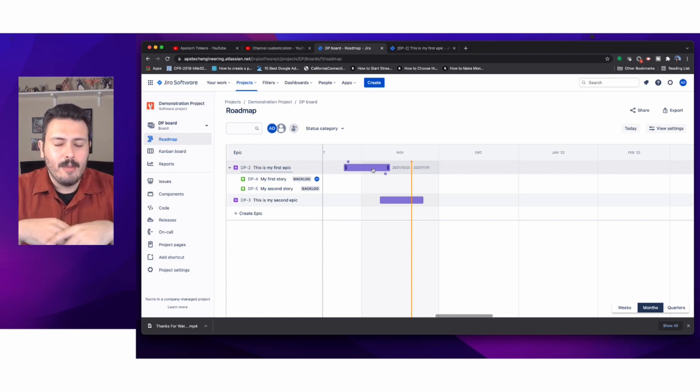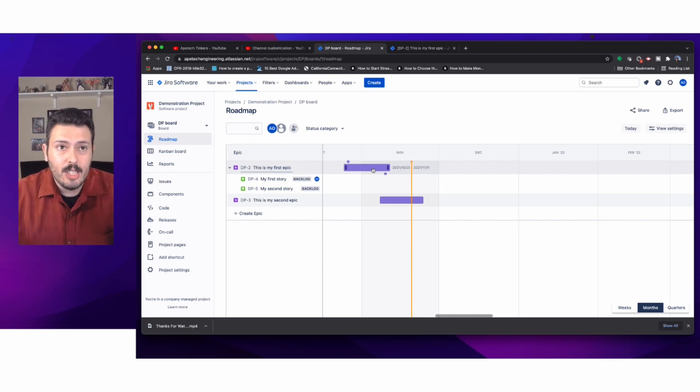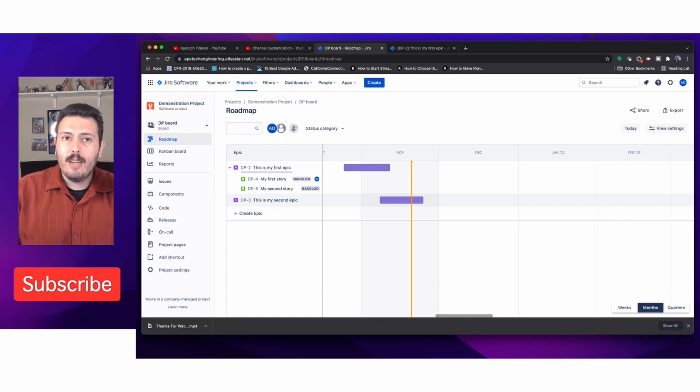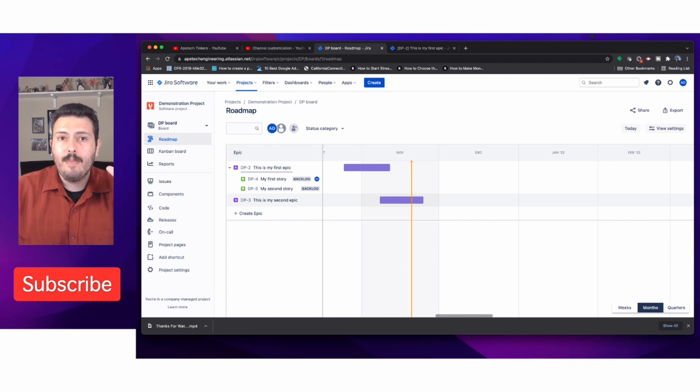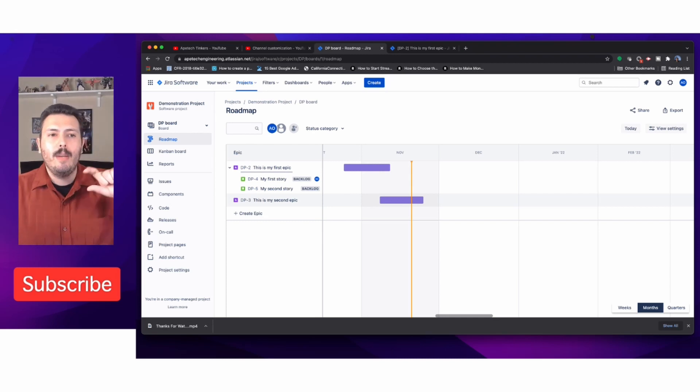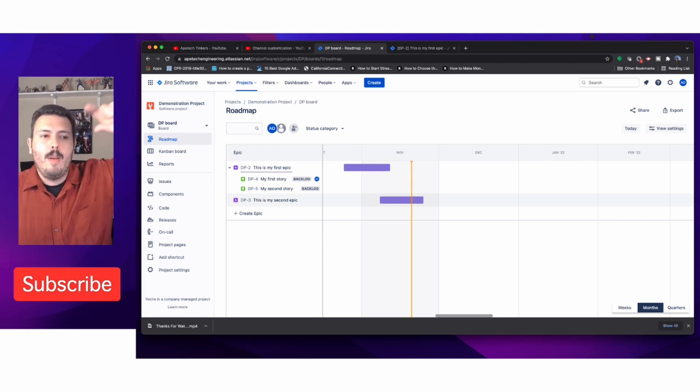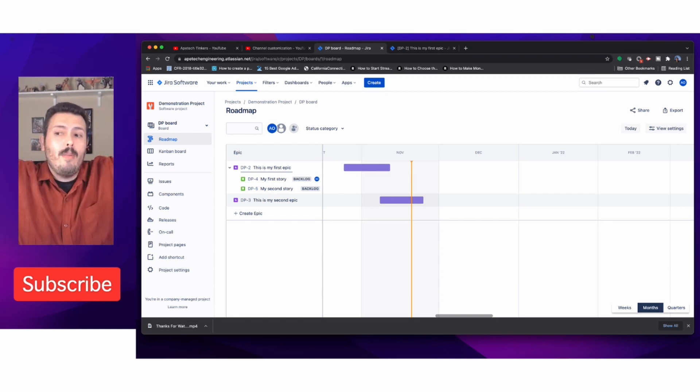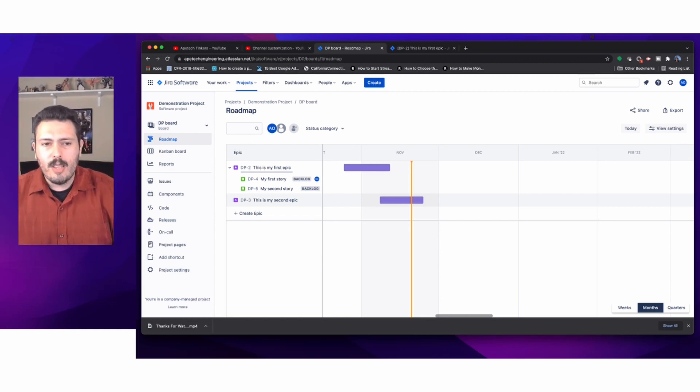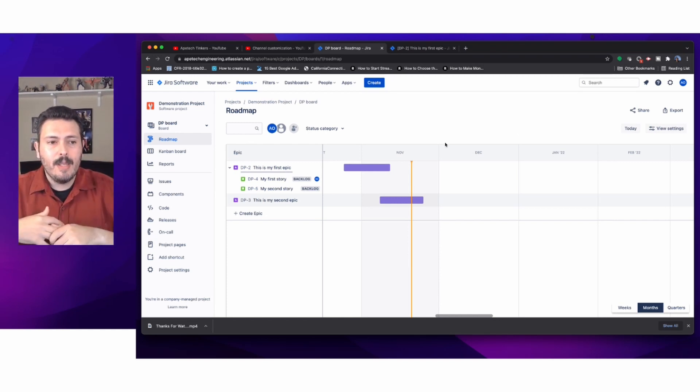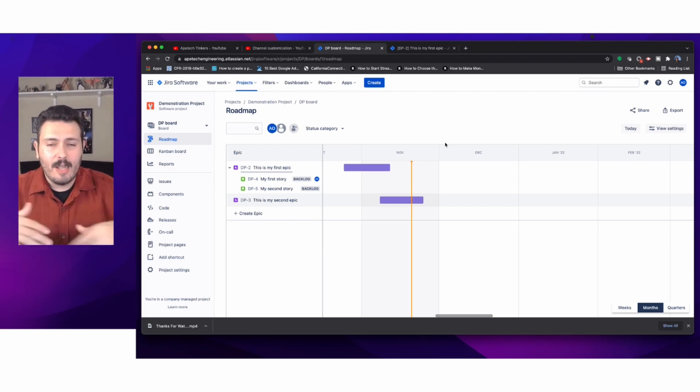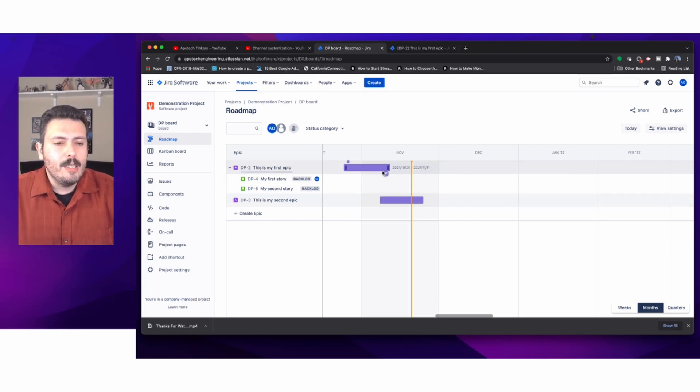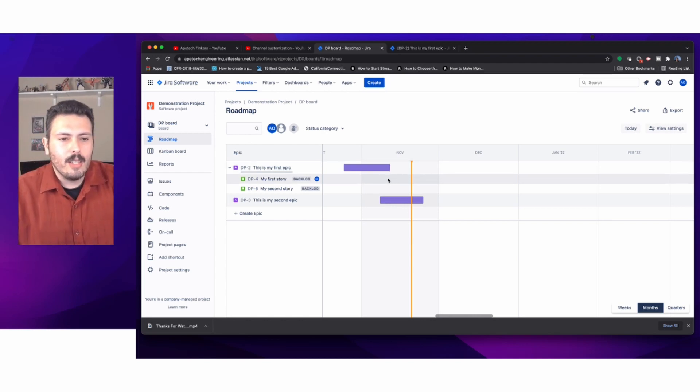Most agile folks will tell you just plan it into the sprint and dates are inherited by the sprint dates. But if you wanted more rigor or structure to your planning, you most definitely have that capability here in this roadmap. An epic in Jira is the highest level of hierarchy you're allowed to go to. If you want to have an issue type above the epic, you can do that very easily if you have the premium subscription.